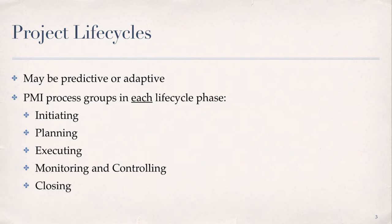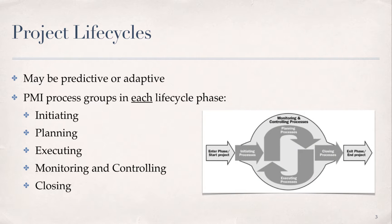PMI identifies five project management process groups that should be present in every phase of a project, namely: initiating, planning, executing, monitoring and controlling, and closing. It is very important to keep in mind that the process groups do not represent project life cycle phases in Agile project development. Furthermore, all of the process groups are represented in each iterative development cycle when working in adaptive project life cycles. An illustration of this is provided in a diagram showing a single development cycle in a project that encompasses all five of the process groups.